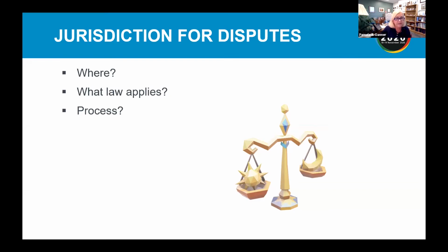To provide for this, there should be a process that is outside the court system of that particular country. I recommend a dispute resolution process that includes first mediation and the process for mediation and how to appoint a mediator. Then if that does not resolve the issue, then there should be a process for arbitration. And that should also discuss how to appoint an arbitrator or more than one arbitrator and who pays for the arbitration.